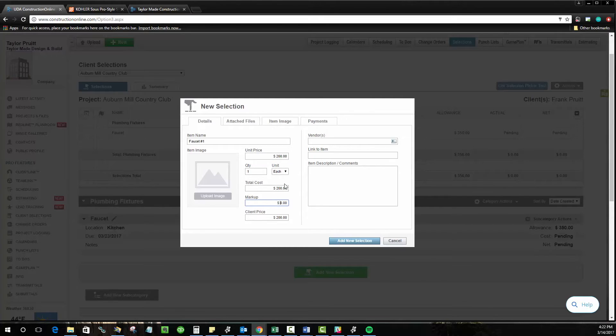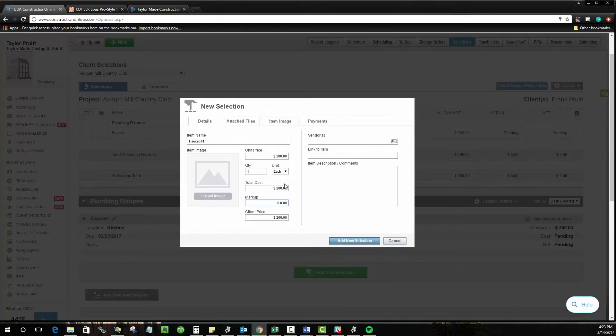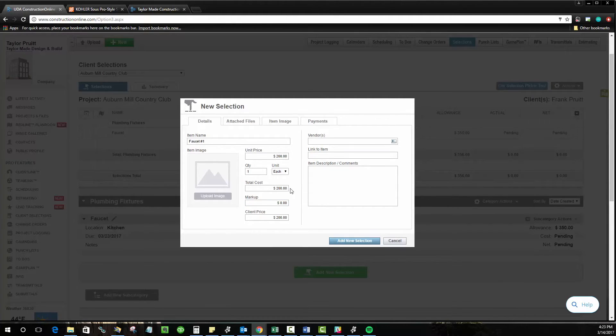Typically, the markup on your selections is going to be handled by the markup that you have within your base contract. If you want to apply additional markup for an overage here, you can. Also, a negative markup can be applied in order to account for a discount if it's under budget. But in this case, I'm going to leave it as $0. We're only talking about the material cost in this case.